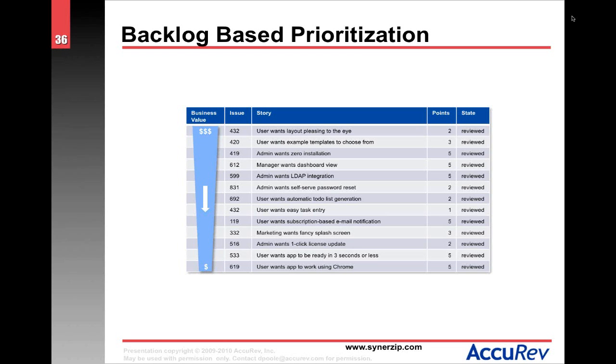For the things that are done and the things that are at the bottom, the ones getting pushed, right? And if something new comes in that somebody wants, you say, well, is it more important than the thing at the top? No. More important than that one at the end? No. Well, that's good, because that one at the end, that's the end of the release. So you clearly just agreed with me that that's not going into this release.